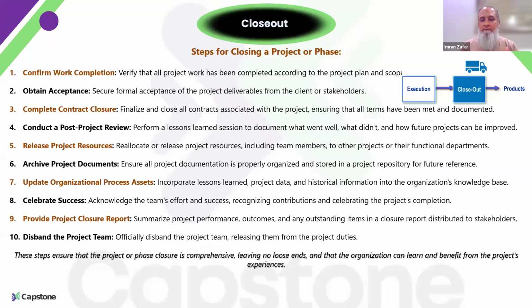Coming to the closure of a project. Closure of a project happens when all the deliverables are complete. You verify that everything is complete, that we have completed all the project scope. You secure acceptance from your stakeholders that we have completed everything. You close all the contracts.